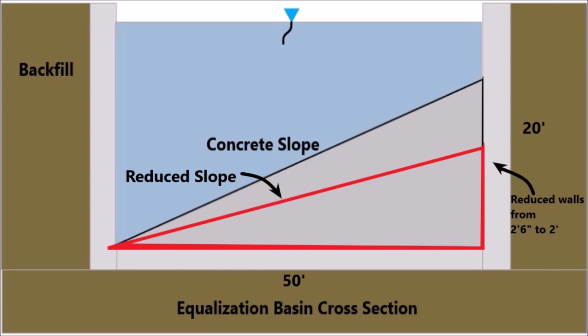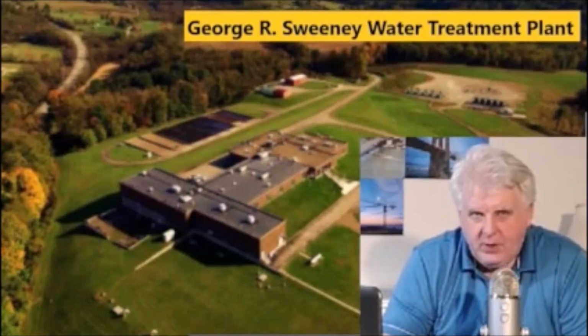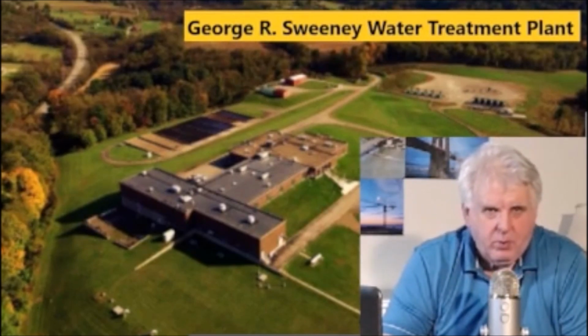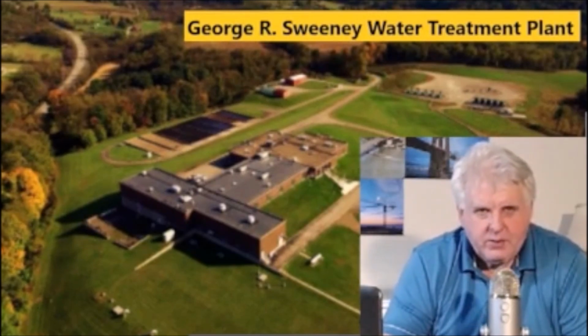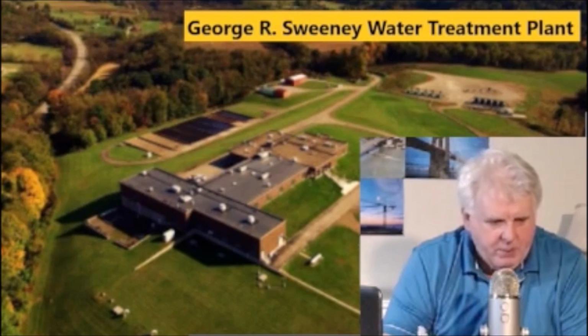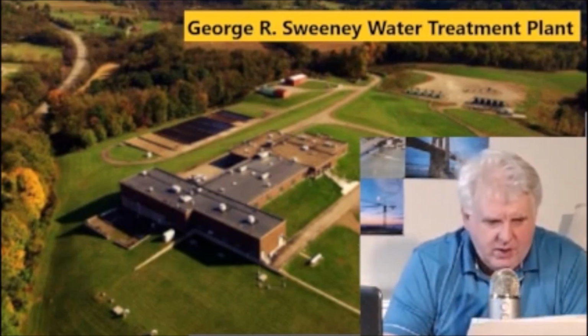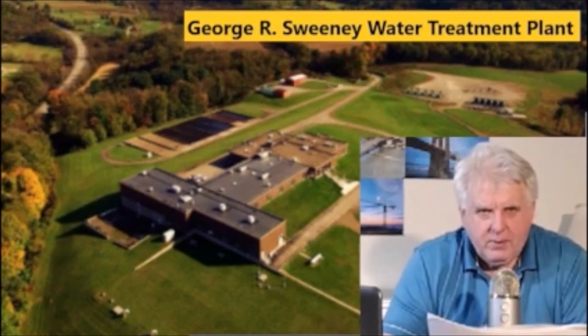The owners accepted this value engineering cost-saving item and also accepted that they may incur additional maintenance costs in the cleaning of this basin. This experience with these professional value engineers was eye-opening to me as to how they dissected a multi-million-dollar water treatment plant and came up with 163 value engineering suggestions while still maintaining the functionality of the water treatment plant. And as you go through the value engineering suggestions, they went through the whole gamut of the design,